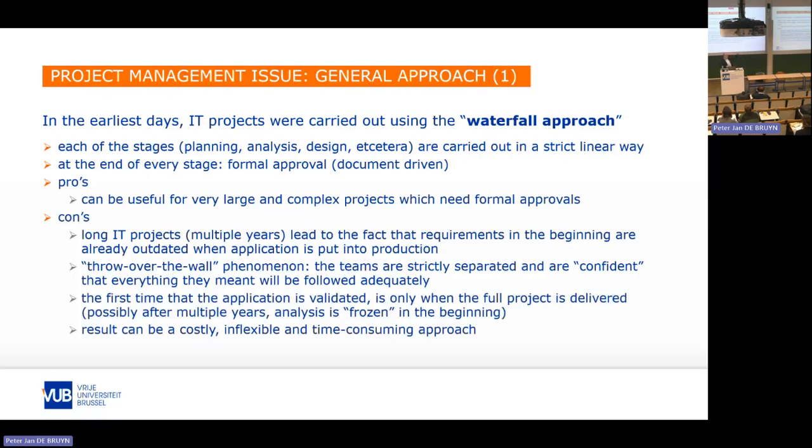As we saw in the difference between verification and validation, there might be projects that take a long time, and so between the time the requirements were documented and the time the application is actually put into production, when it went live, there might be a lot of time spent. And of course, the world changes, people change, businesses change, and so the requirements that were put on paper at that time might not be the requirements that we have today. So there might already, due to the time spent, be a problem.